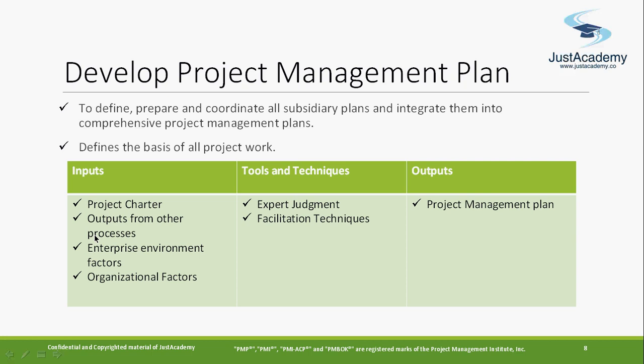Enterprise environmental factors and organizational factors. As I discussed, these are two things that will be coming. In the enterprise environmental factors, when you're creating a project management plan, you have to consider what are the external factors that can affect your project. As I said, like construction projects, you need to take legal things into consideration. And if you're working in pharmaceutical, again, government regulations are there and need to be followed very carefully, as they can affect your work. Organizational factors can also affect your project, so that needs to be considered when you're planning.